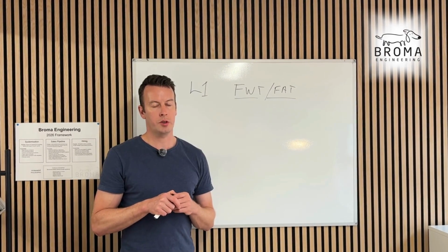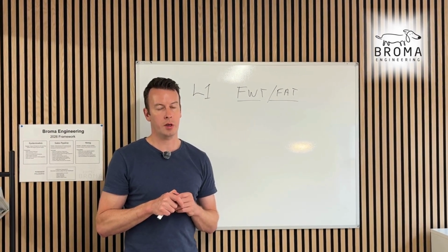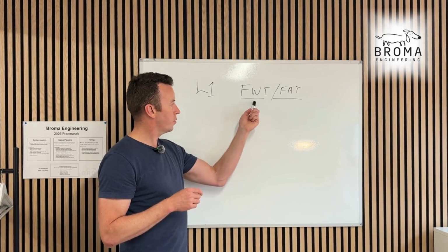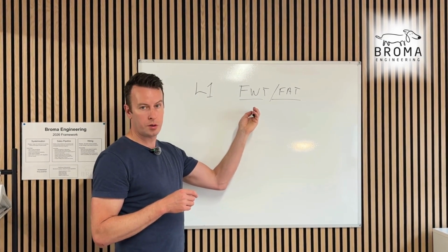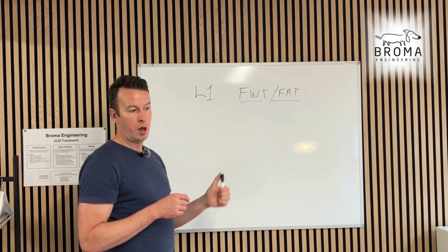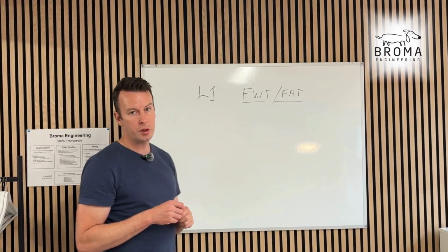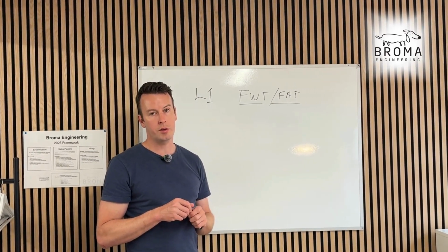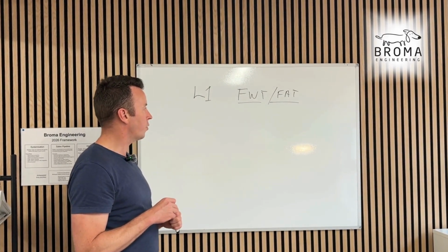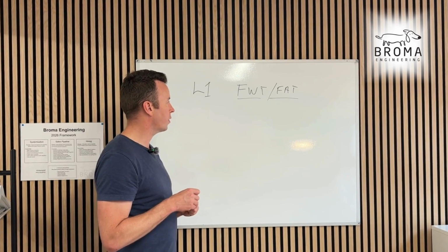Okay, so as a commissioning manager, as a planner, as a mechanical manager, we need to make sure we know when the FWT is happening, the vendor knows, the engineer of record knows, the client team knows. Any representatives from the GC, the mechanical contractor, whoever needs to go is invited to that. FWT, we know the location. We know that the factory is going to have it ready on time. We have everything we need there.